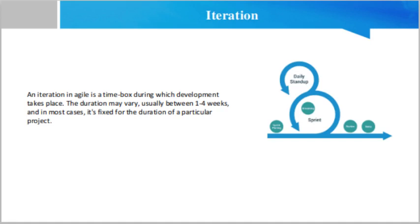First, we shall discuss about iteration. Iteration in agile is a time box during which development takes place. The duration may vary, usually between one to four weeks, and in most cases it is fixed for the duration of a particular project. A crucial aspect of the agile approach is the underlying assumption that a project is exclusively made of a sequence of iterations, except for a very brief planning and vision phase before development takes place.